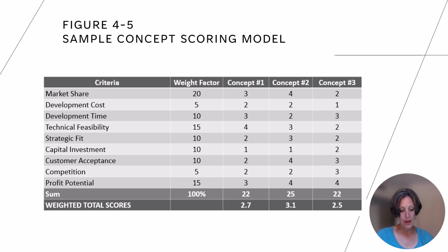Prototype tests. Because concept number 2 is the lead candidate, a full prototype is then tested with a larger group of potential customers. While Stage 2 concept tests generally assess how favorably consumers view the new product idea, prototype tests must evaluate the full design. Generating a full prototype also involves insight for the final manufacturing scheme of the new product. In turn, this provides more accurate engineering and cost estimates for the business case. The business case accuracy going into the development phase should be plus or minus 20% or better. Stage 4.